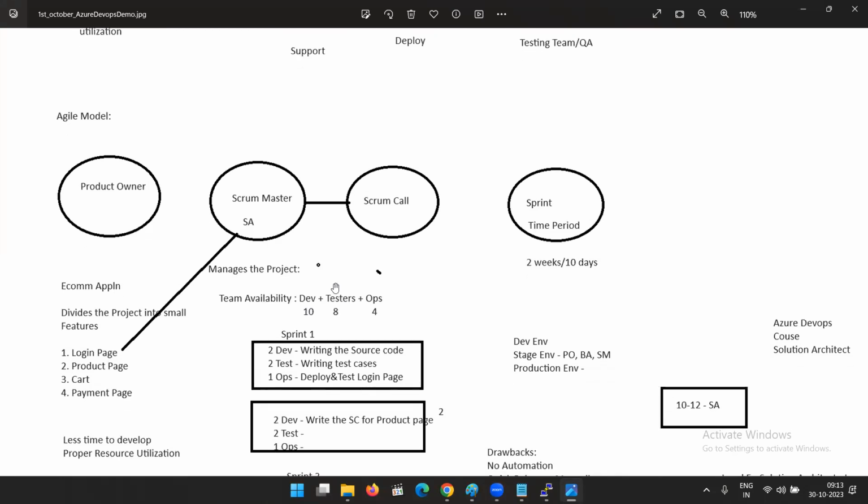Like there are 2 months to develop a project, and in those 2 months, in the development team, they ask that if you are going for a leave or holiday or something, if I am a scrum master, I'll say, okay, just inform me 1 month or 1.5 months before, so that I can plan that sprint accordingly, right? So I'll check the team availability, like how many developers are available, what are their leaves and all. Testers, operations team, all those things.